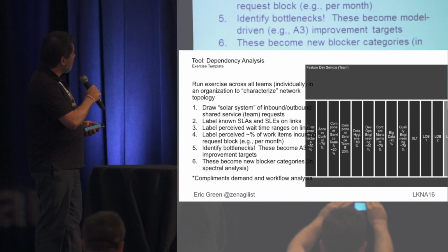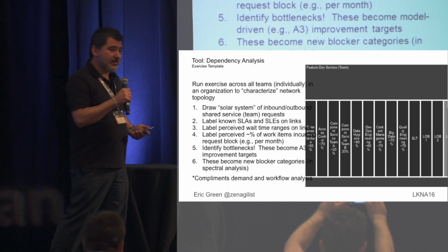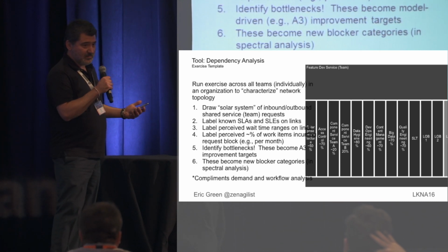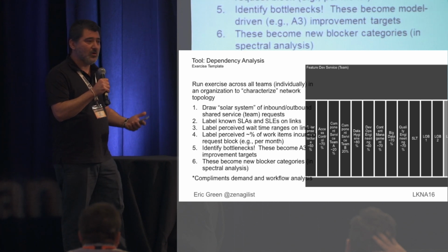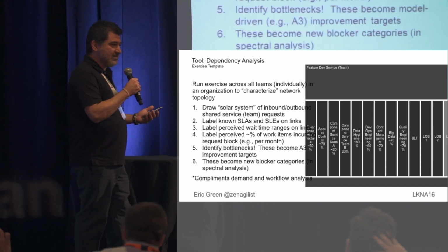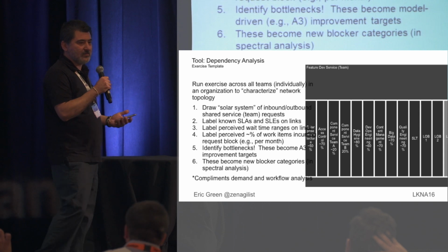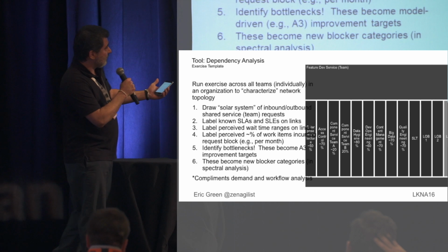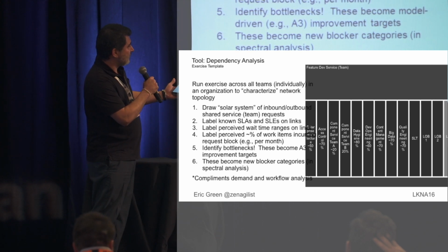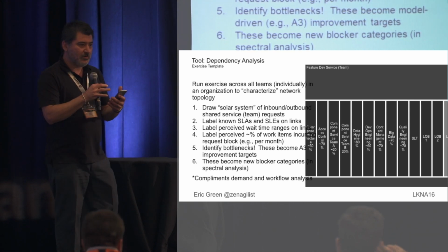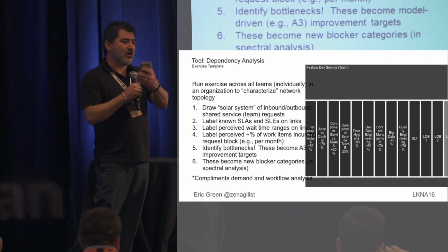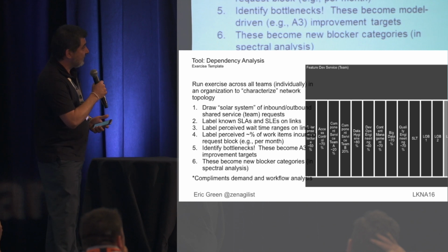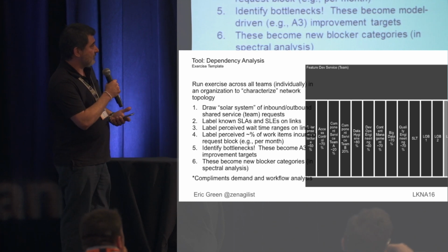So one of the things that I've used over the last couple of years in organizations to understand these dependencies better is an exercise that you can go and implement with various teams or services, whatever the vernacular is inside of your organization. I've done this with a large number of teams, and what we do is we take a team, put you at the center of the solar system, and then we draw the dependencies around, and you draw the arrows in the direction of requests being made, and you can get some very valuable information from this.